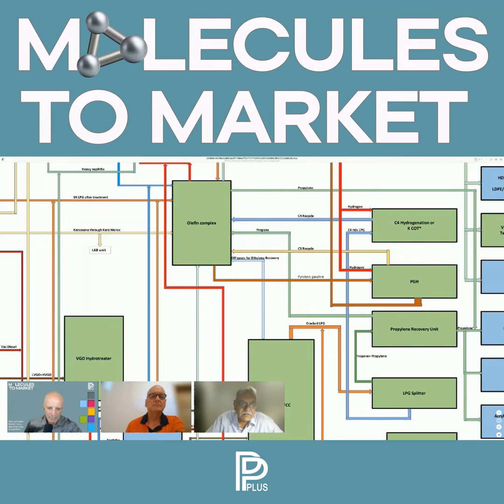So whether the cost goes up and down, the problem of that remains only between the owner and consultant. But a contractor who is going to commit himself on a particular contract will put a price tag to the risk which they are taking, because there are penalties if they don't do it in time. So somebody has to load those penalties.